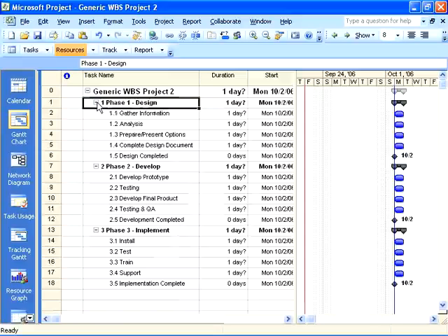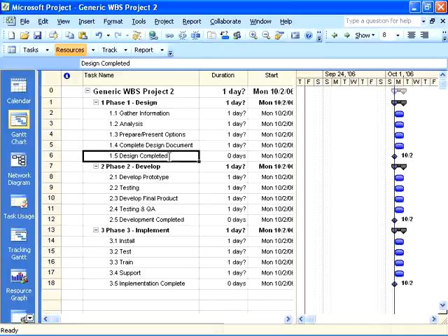So I think it's really important that you understand the difference between phases, tasks, and milestones. A phase is really a major component, could be a deliverable or an interim deliverable, and in Microsoft Project we simply refer to those activities as summary tasks. And a task, we know what those are, and now we know what a milestone is. So those are 3 key things, and that's how Microsoft Project differentiates between phases, tasks, and milestones, which are important to know as we go forward in our planning cycle and into the updating, tracking, and communication modules of this program.